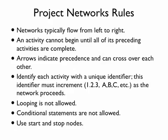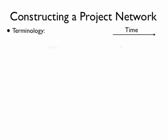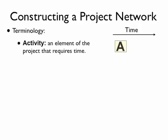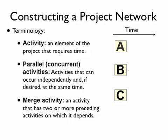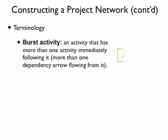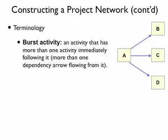A few key pieces of terminology: an activity is something that requires some amount of work or time. A parallel activity means two activities can occur independently and at the same time, with no dependency between them — A and B are an example. A merge activity is one where multiple predecessors must complete before it can start — activity D is a merge activity where A, B, and C must all be completed first. A burst activity is the opposite — activity A is a burst activity, being the predecessor for B, C, and D.